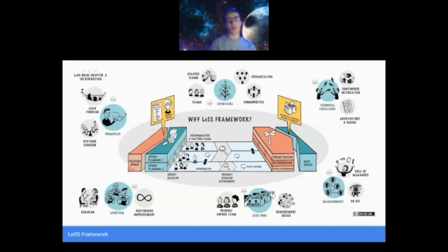Then we go back into working on our feature teams until we get to the sprint review. In the sprint review, teams show customers what has been accomplished over the sprint and how to best increment from there. Following this, teams reflect on what they did and how they can improve as a team.